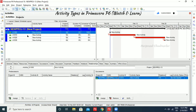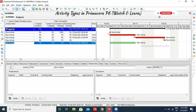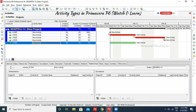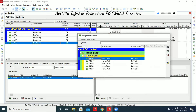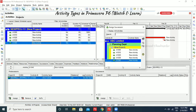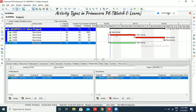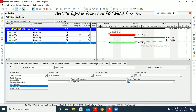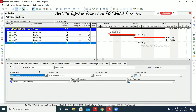Why I scheduled before is because we should learn what a Level of Effort activity is. I'm going to add an activity and put some duration. By default a 5-day duration is coming. I'm putting the predecessor as the Start Milestone and the successor as the Finish Milestone. Now in General, I can go for Level of Effort. When you change the activity to Level of Effort, notice what happens in the Gantt chart — the bar becomes invisible.